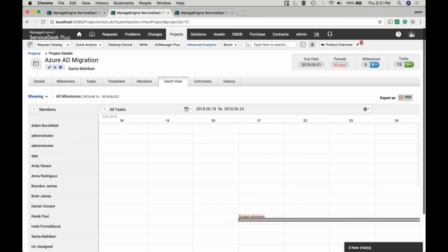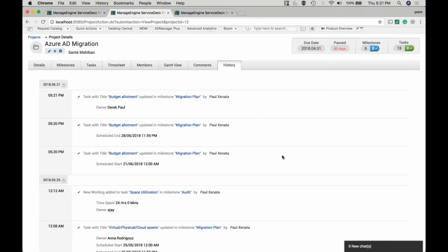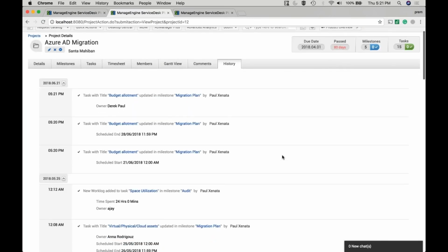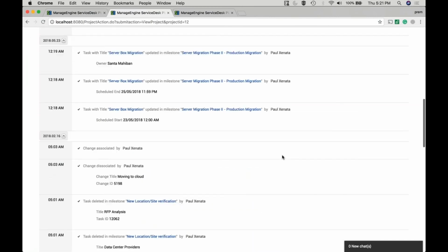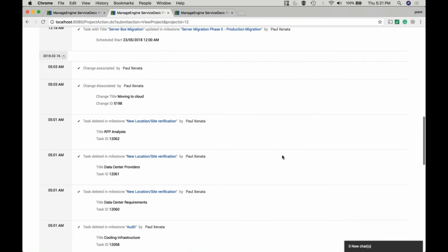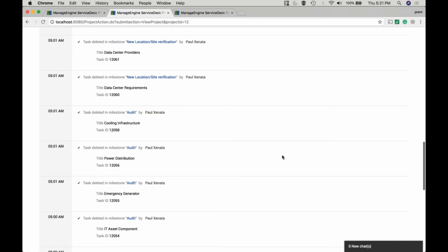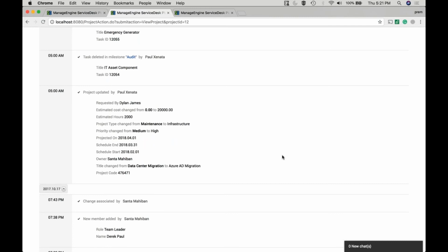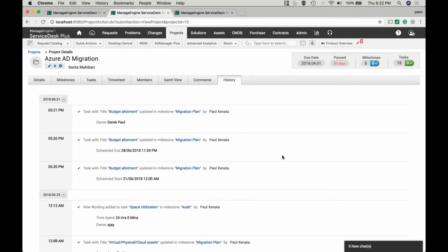And finally, you've got a history section where all the activities that are performed in this project are chronologically recorded for future reference. So if something went wrong and you'd like to do a failure analysis, you can go to the history section and quickly do some research and find out what went wrong. In technical terms, it's called a post-mortem analysis.